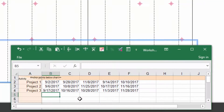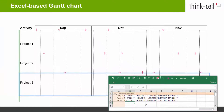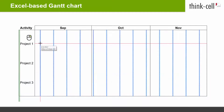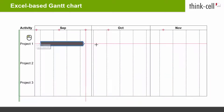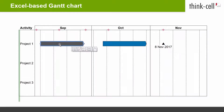If you work from an existing data range, do the following to quickly fill the Gantt chart without manually anchoring each item. Start with the initial row, insert items as needed, and attach them to the anchor points.